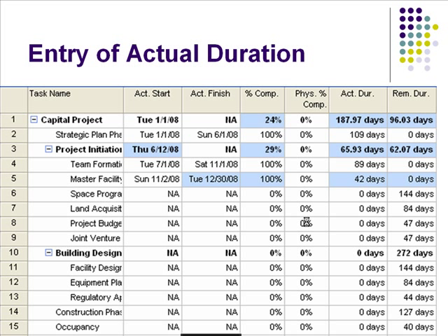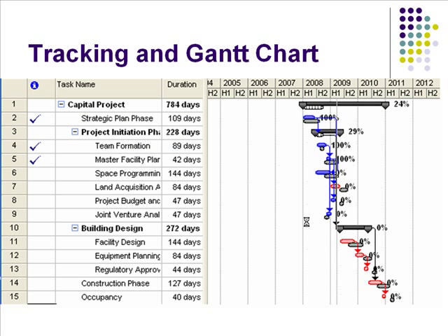Then, after saving the baseline, which is the original planned budget plus approved new items, the actual duration was entered by looking at the tracking view of PERT. This shows the tracking information for the project with each task listed with its duration.